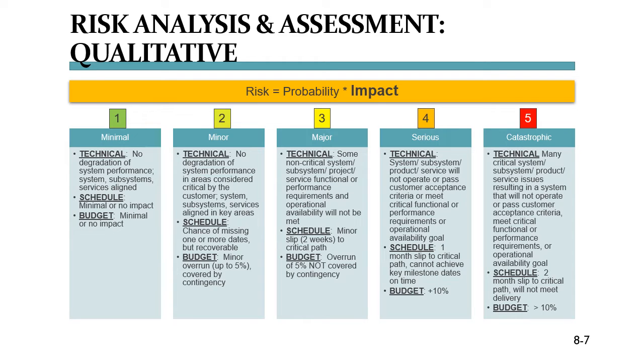Where in an organization do you find these taxonomies for probability and impact so that all you have to do is look up the numbers for each risk? Usually, you should get these definitions from your friendly PMO, the Project Management Office. If there is no PMO in your organization, your finance department definitely will have and use these taxonomies.